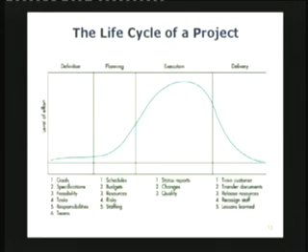Your CPM must be complete, critical path method and so on. You have identified all the tasks, defined them. You define the work packages. Only after that you can assign the contract. You can go ahead and award the subcontracts and so on. That has got to be done right there. Before you deliver, obviously, when your execution is complete, you have to make sure that the project is actually certified. The product is certified or the service is certified to be okay by the site inspector.